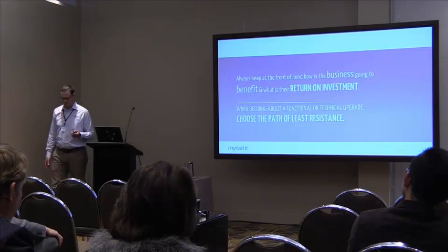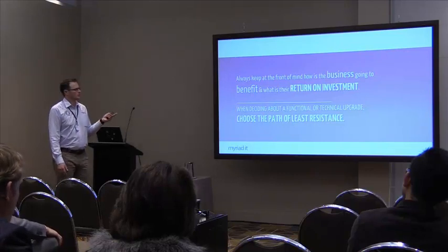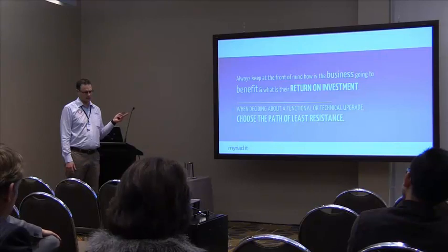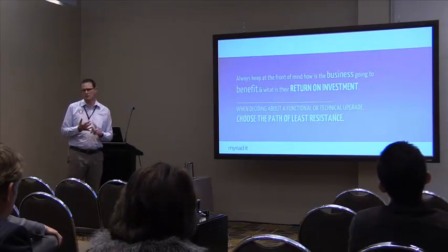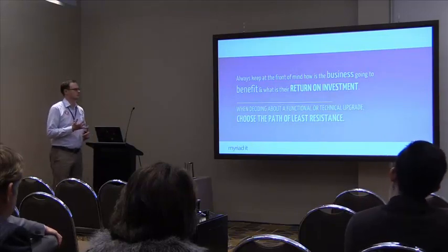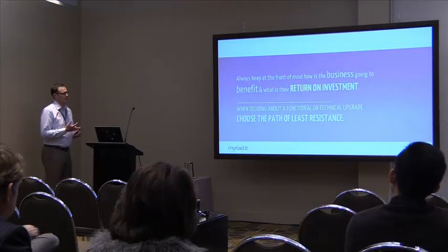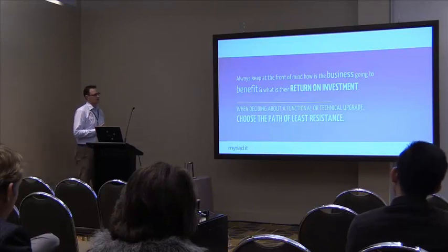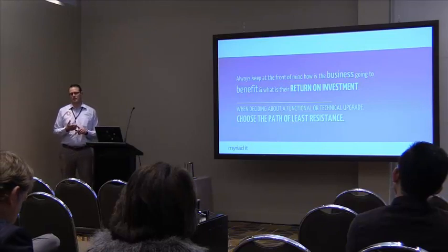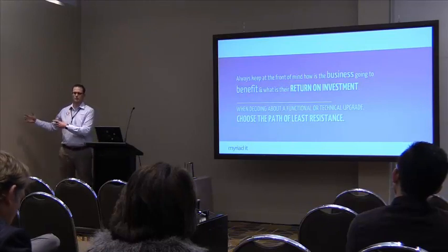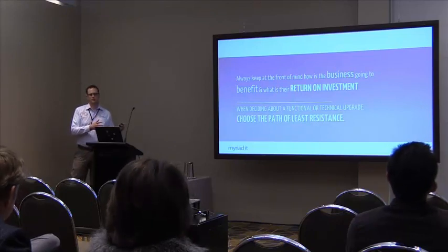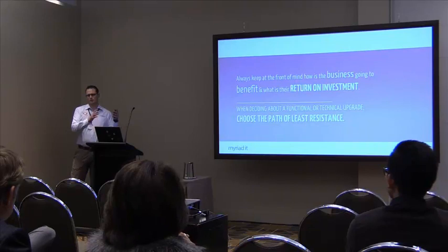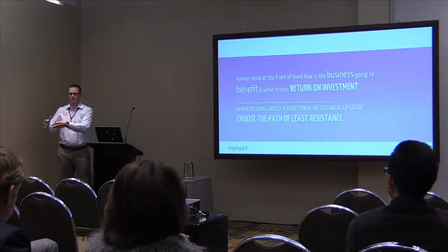In terms of the business case, the two things to take out of putting a business case together are: what is the benefit to the business, and what's the return on their investment. The other part is the way we always think about it first: go down the path of least resistance, the tech upgrade. Get that done, then look at subsequent phases. It's easy to put through a smaller capex and smaller time, get the first part done, then look at the next part.